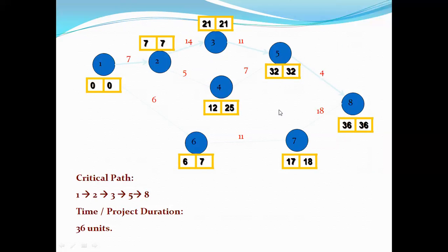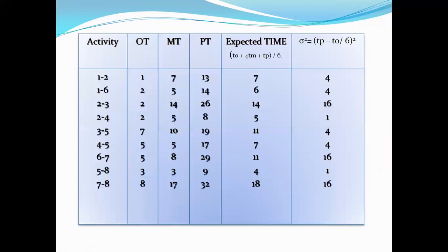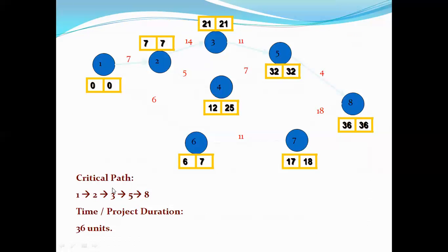and we have to complete it till we get the end point. How can we know which point is the end point? See it here. After 7, the activity starts from 7 and ends at 8. So 8 is the ending point. By this we can draw this network diagram. It shows the events, the activities, and the durations also. Now the first column corresponds to TE. How do we calculate the TE? By setting the first element equal to 0. So this one is TE.